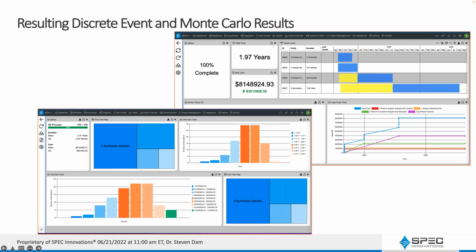But you can see that you can have pretty substantial range sometimes in that, and if that's the case, then that's kind of a measure of your risk. And so you're trying to understand that better and capture it with that knowledge. So when you start seeing things going off whack, you realize that there's other probabilities that may be coming into play. Maybe something happened like major inflation, and all of a sudden now my cost to people has gone up significantly. I think a lot of us have experienced that just recently, and that's just the reality of things. So you have to deal with that. And how am I going to mitigate that risk?